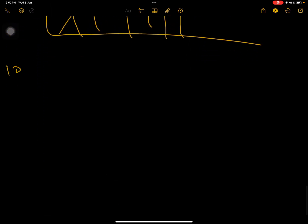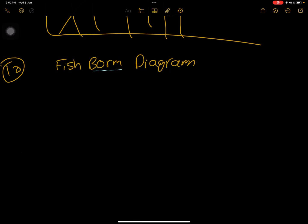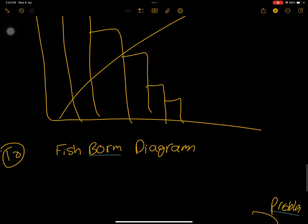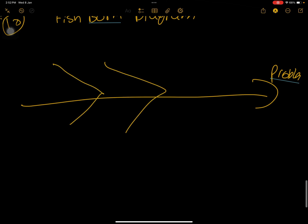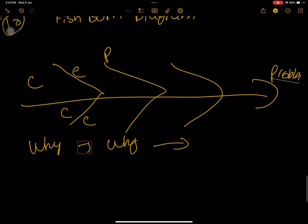Once we collect data from the Pareto chart, we can use the fishbone diagram, also known as the Ishikawa or cause-and-effect diagram. We put the problem on one end and perform a why-why analysis: what is the cause, how is this affected — cause, effect — keep asking why this happened, why, why, why. This is typically applied across categories like people, process, equipment, and environment. It is a very important tool used frequently.